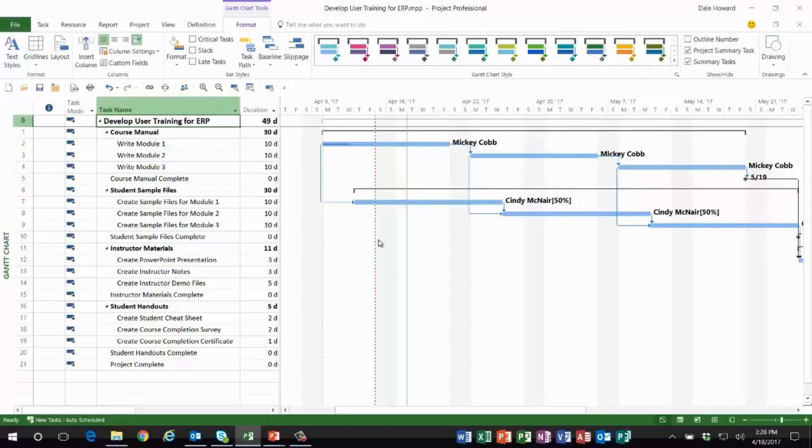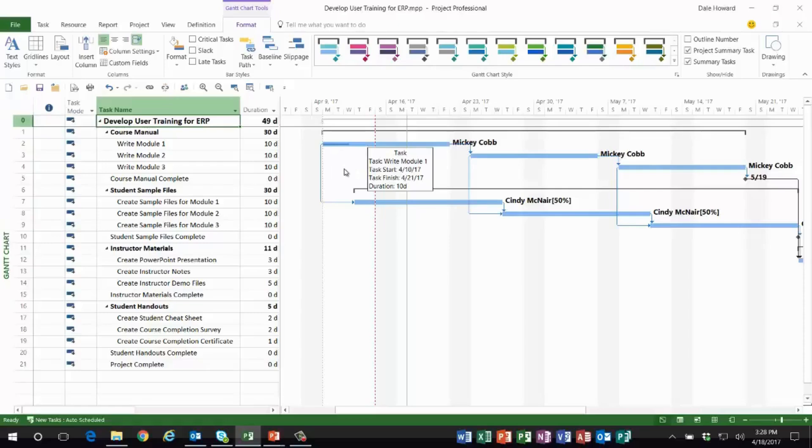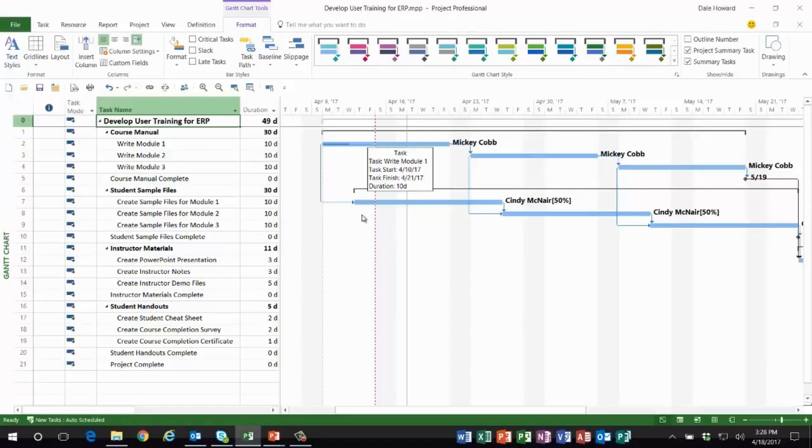the next week. Now here's our problem: Mickey was supposed to be half done, but she only got a quarter done. The portion of the Gantt bar that is light blue to the left of the status date grid line—that's called uncompleted work. On the next task, Create Sample Files for Module One, Cindy was supposed to